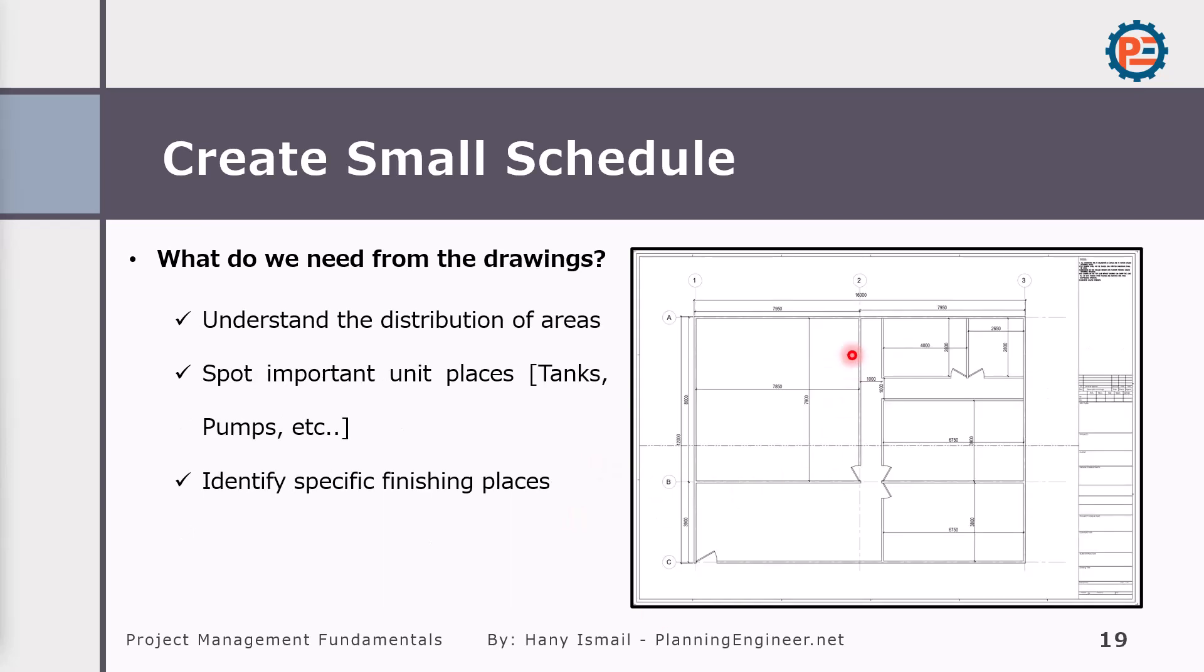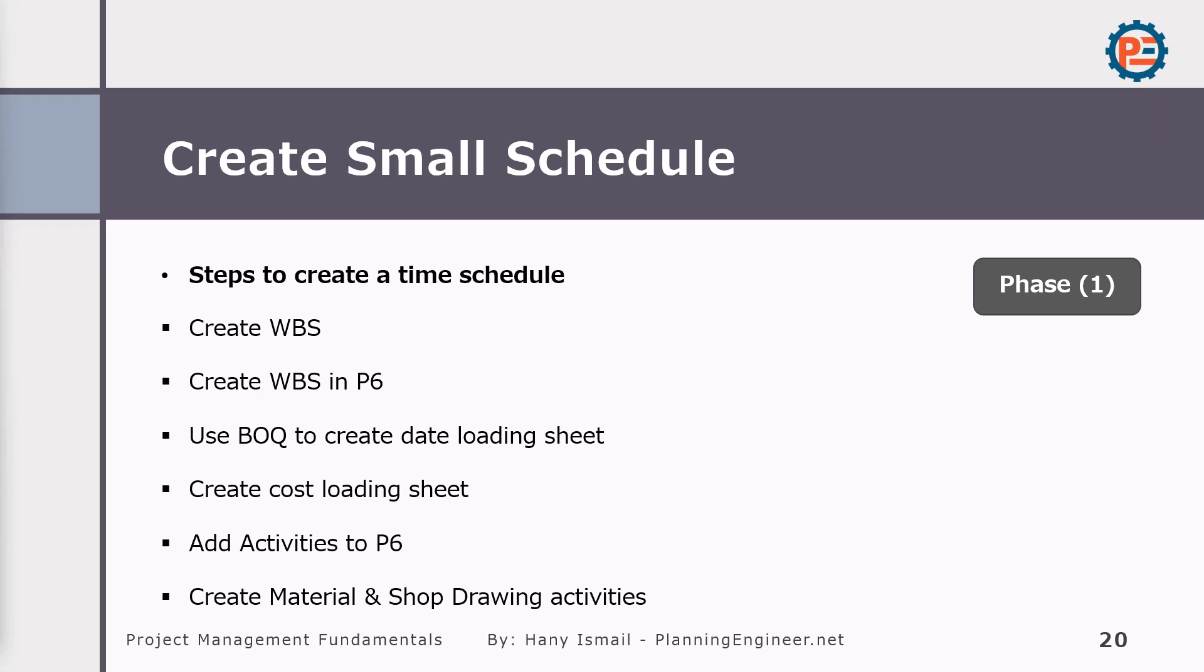So why we need the drawing? We need to read the drawings to understand the distribution of areas. I might have one room which has some certain activities, but another room or another floor, there are no similar activities. So when I'm creating my time schedule, I need to know which activities I should put in each floor or area. Also, I will need the drawings to identify specific finishes places. Now we knew the documents or inputs we need, let's discuss the steps required to create time schedule.